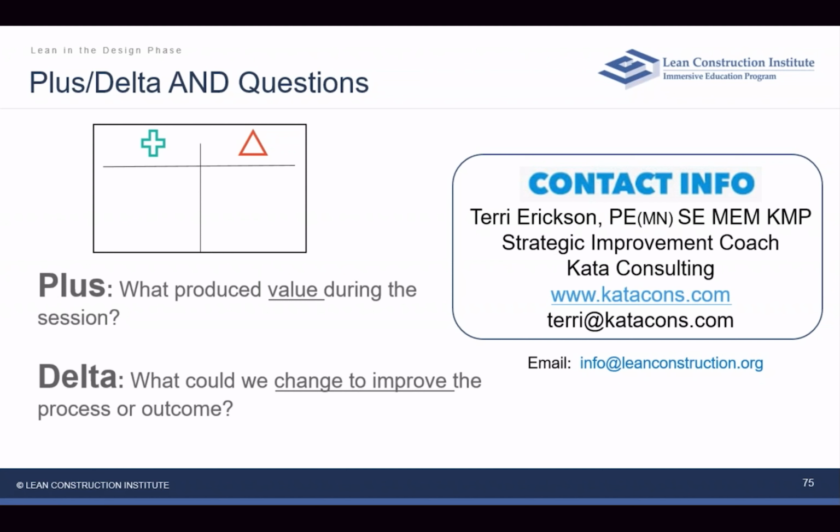The key is we're not trying to put in that we're going to do a design cycle two times or three times. Instead, we're going to be evaluating and building value for the customer, and then pursuing a more detailed design with the particular one that gets brought forward. So this is very key. It is very, very hard, speaking as an engineer, to hold engineers back from designing fully. So the key is how do we hold back, just get conceptual, and agree upon what we're going to do at each step.